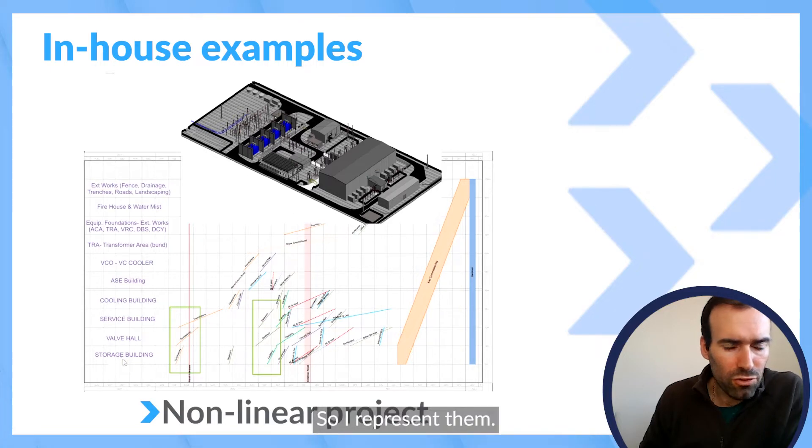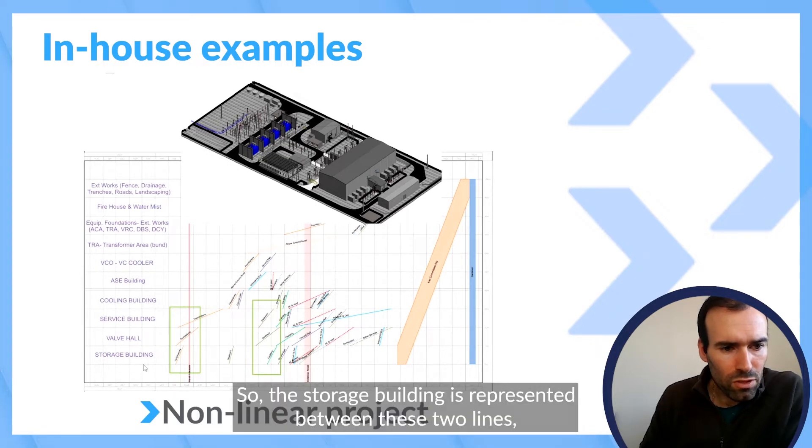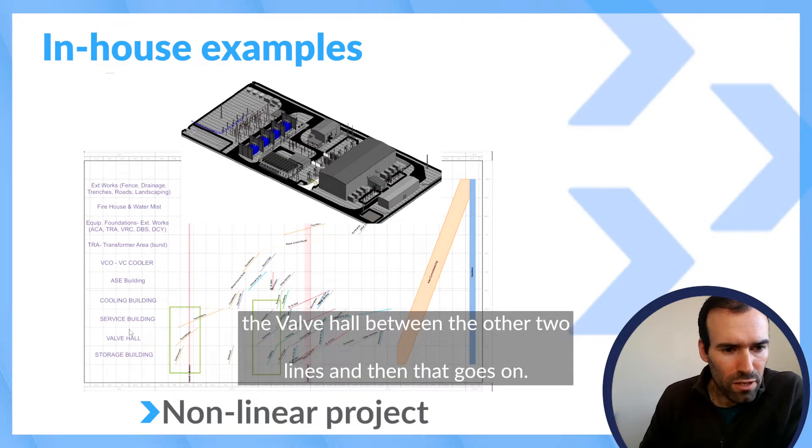So I represented them, so each building in between these two horizontal lines. So the storage building is represented between these two lines, the valve hall between the other two lines, and then that goes on.